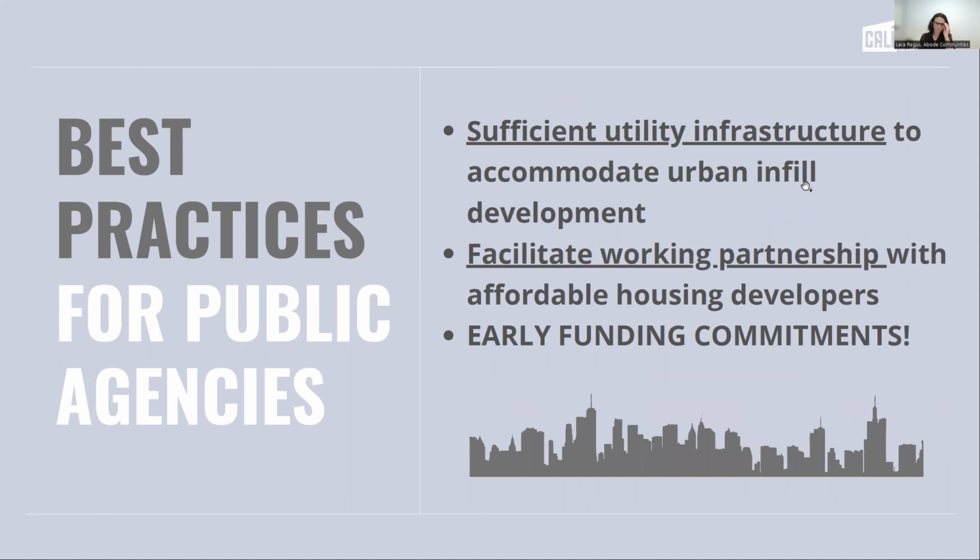A couple other things to mention. Again, utilities, the electrical grid, water, gas, all those things. We're typically building in infill areas anyway, but we really want to be working on sites where we know the infrastructure is already there, that it is not going to cost, say, $1 million to upgrade the utility infrastructure in the neighborhood just to facilitate building more affordable housing. So that's a really big deal.